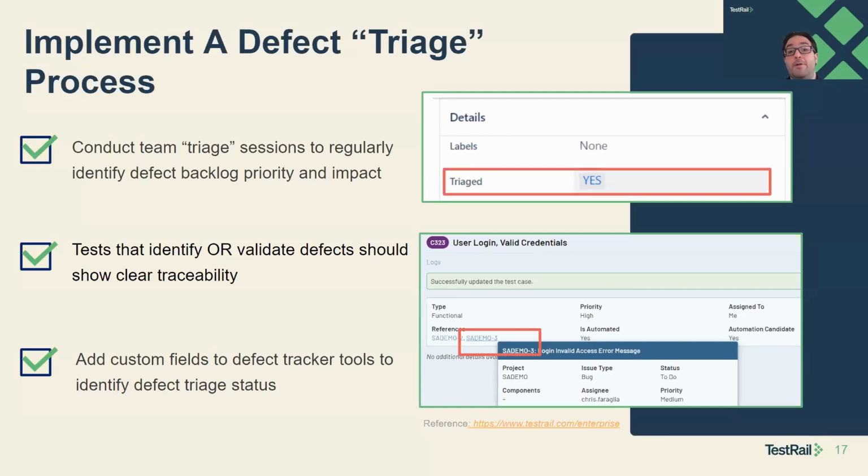is having a triage field. So you can have a label or checkbox. This is a Jira custom field label that I added. And basically, as you review the list, you can have a query, and you can query any defect in the product backlog that does not have a label of triage value yes, or there's checkbox controls. You can set it up however you like.